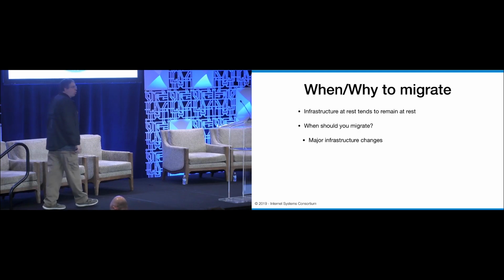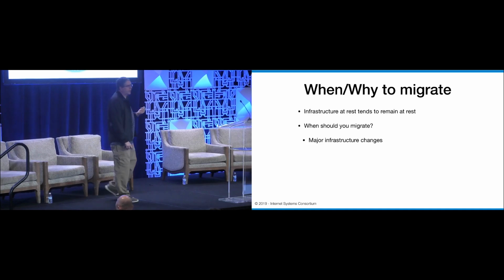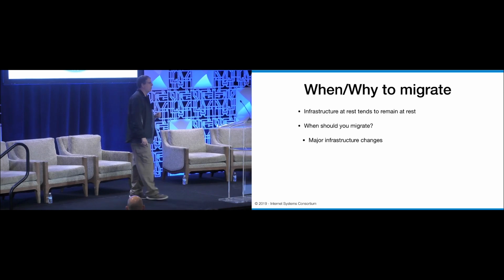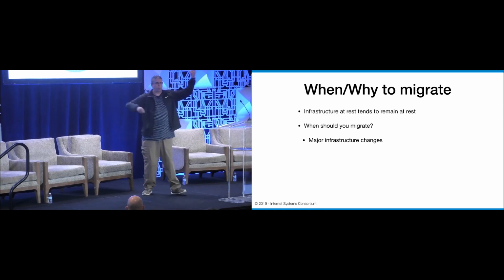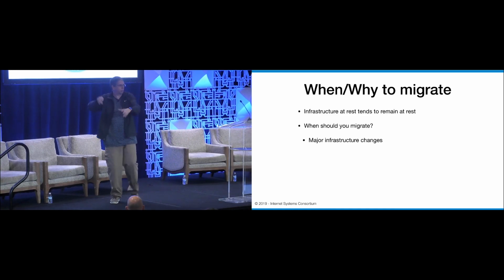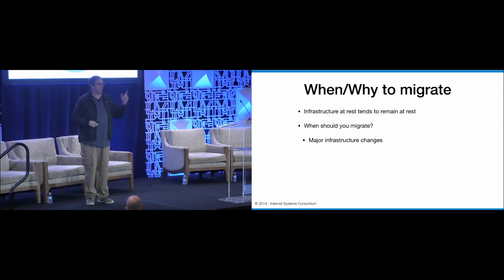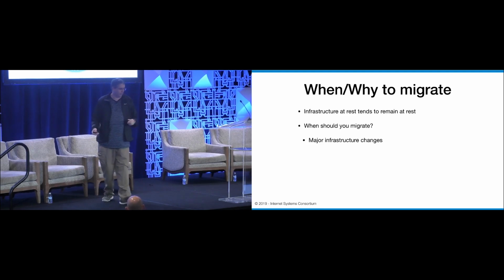Well, when you are already doing another major infrastructure change, is that a wonderful time to change out your DHCP underpinning? No, it's horrible. You've already got your network in pieces, in shambles, and this part of it's working, but that's not. And then everybody says, well, it's DHCP's fault. And you can't say, no, it's not, because it was working yesterday, because now you're saying, well, I don't think it is because we're running new code and the configuration kind of looks like it did yesterday, but I'm not really sure. That's not a good position to be in.